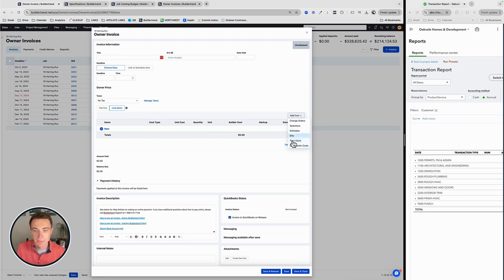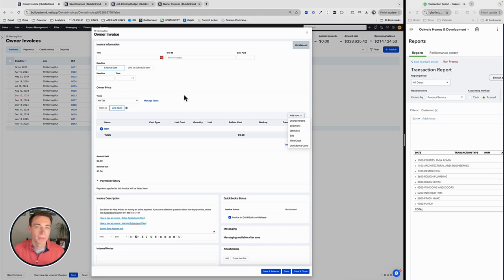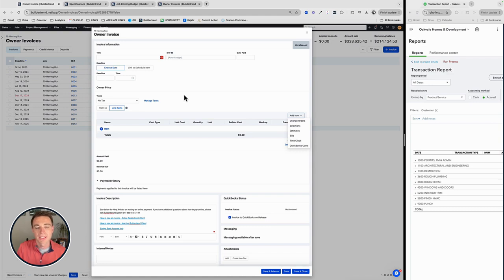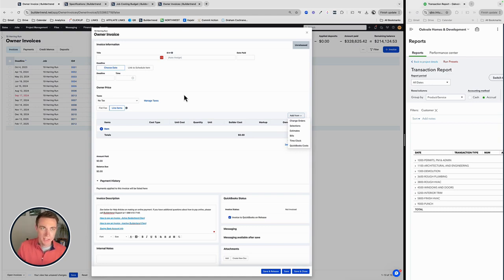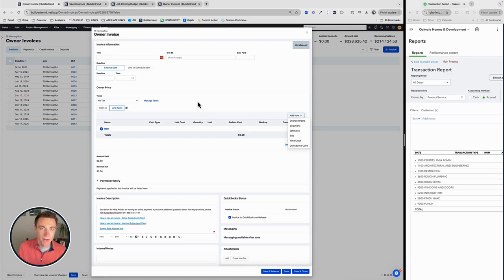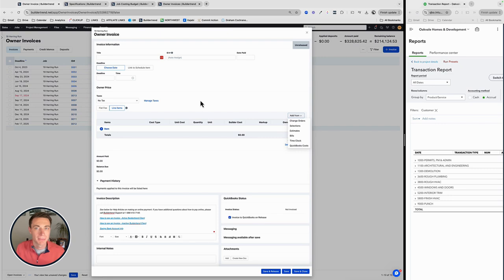So I'm going to go ahead and I can add one of these. Before I do, I want to think about what the markup is going to be on all of this. So a really important component of any open book priced project is we have to be very transparent with our customer what our markup is going to be. It's not going to be zero. We can't possibly make money with that. We have to understand what our markup is going to be.